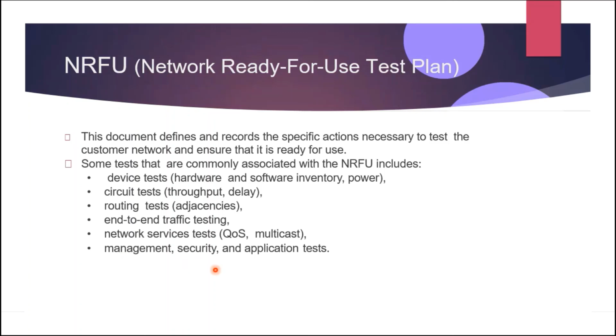In some cases, the NRFU testing extends to a limited production pilot where a low-risk site or portion of the network is cut over to the new network and monitored closely for a probationary period of time.